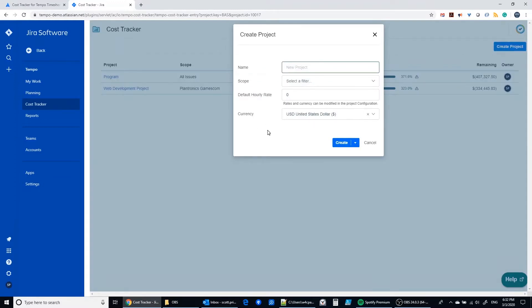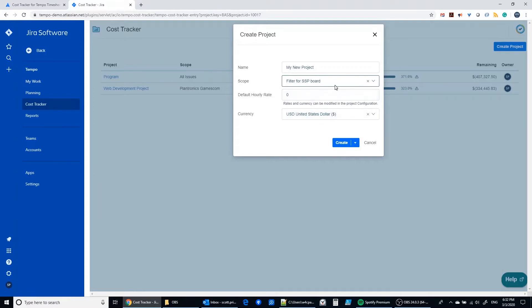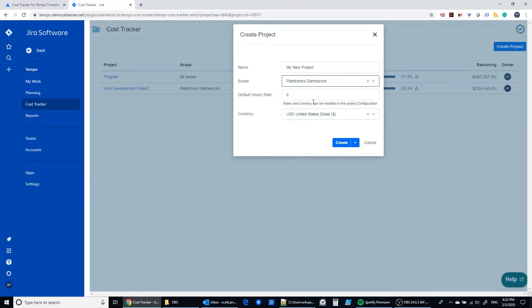You just have to establish a name and you can establish a budget if you like. You have to select a filter that you want this project to be based on. I'm going to select the Plantronics because I know I have some time and cost there.